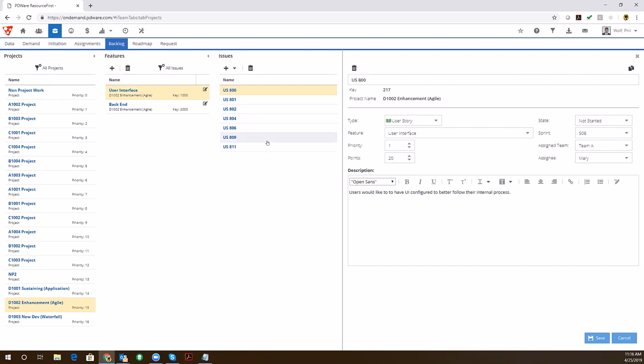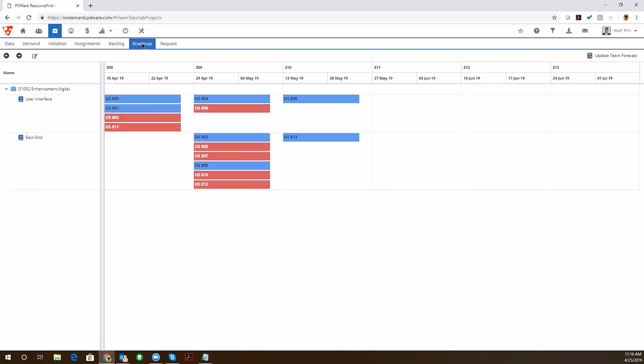And if you remember when we talked about teams, when we're mapping teams, teams have a velocity and user stories have a priority. And putting all those things together, what we're able to do is create a roadmap which shows when each of the potential user stories can get done. This is one of the reasons why in the Agile world it does help to have some element of resource management, because you can start to do some validity checking, just like you can with the utilization report. There's no coincidence that the colors are the same. You can see when things make sense and when they don't.